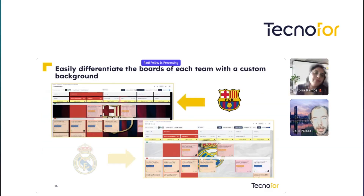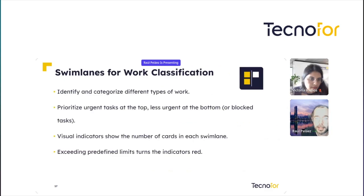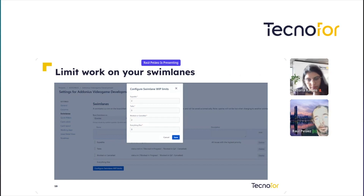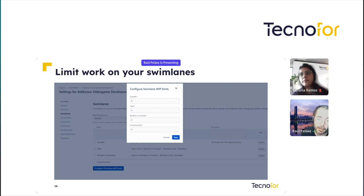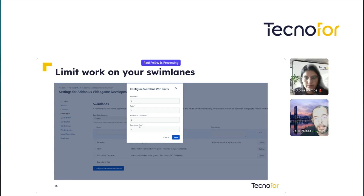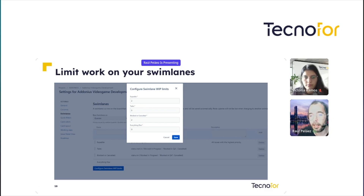We are talking about swim lane work classification and how to configure these limits in swim lanes. In your typical Kanban board, once Kanban Combine WIP is installed by your Jira admin, you will see a button to configure swim lanes with limits. Then for each swim lane, you can fill in the limit and save. That's all — and the limits will be shown on the board.